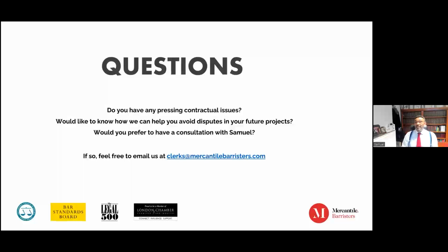Because imagine the obstruction that occupation causes to the contractor in his efforts to complete. Because once you take occupation, remember that the lawful occupant of the site during the course of the project is the contractor, with the consent of the employer. But once the employer takes occupation, it takes back ownership of the site. Yes, in essence, you've excluded the contractor from the areas that you've taken occupation of. They must only enter with your permission.